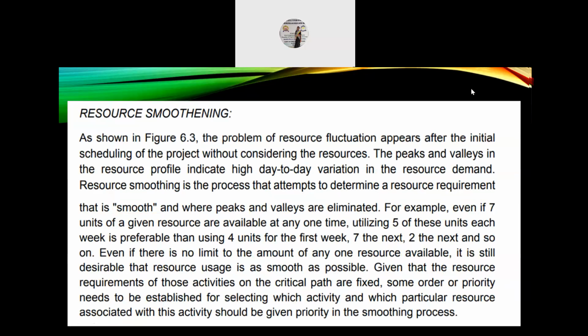Next, resource smoothing. As shown in a previous figure, the problem of resource fluctuation appears after the initial planning of the project without considering the resources. So the peaks and valleys in the resource profile indicate high day-to-day variation in the resource demand.